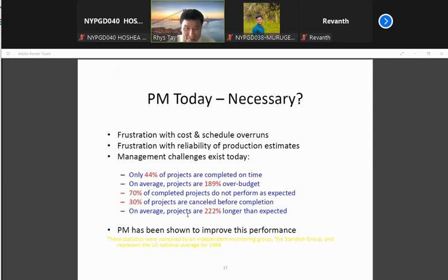All right. And another one is your customer, your client. Last minute, they want to modify this, change that, and that is expected to run a longer period. So you can see all this happening during the project. That's why these are the reasons given for project delays. Another last one will be the weather. For example, every day raining, that's it.